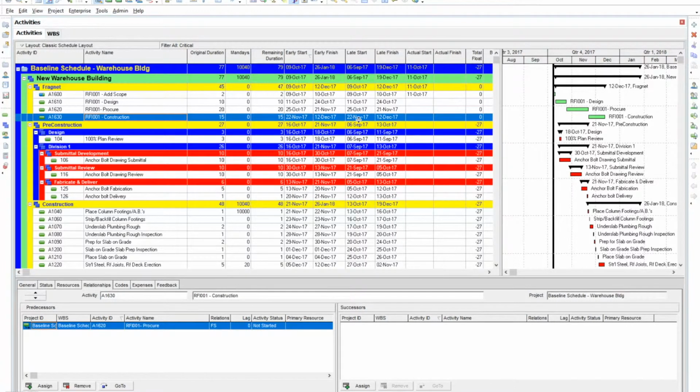That's why we subtracted 27 days from 69, which is the total negative float, and that means that we're only entitled to 42. That's called a concurrent delay. You're not entitled to additional time if there's a concurrent delay, and it's just kind of being fair. I have a delay, you have a delay. Well, if we both have a delay, nobody's given anything. Okay, so that's a key point.